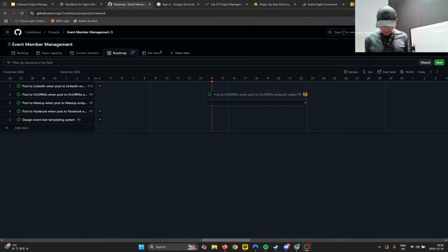Right. So for the benefit of the stream, in the case where you have QA, QA takes time, and QA is blocked by development. So how do you do QA in a reasonable amount of time? Is that a decent summary? Okay. That's exactly what we're experiencing and trying to figure out. In an ideal world, QA would define all their test cases at requirements time, and then they would define Jira issues that are blocked by the development issues. As the development issues are completed, they work on their issues, right? But the problem is they still take time, and you still have bugs that come after that. So it's not entirely a solved problem.